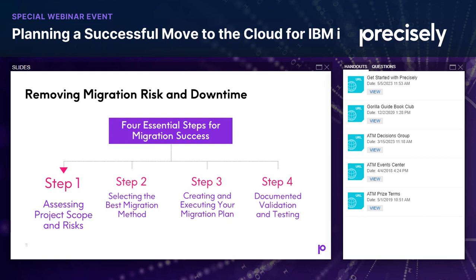Speaking of data, make sure that your data is prepared and cleansed, meaning you don't want to bring over obsolete data. You don't want to bring over a large file with a bunch of deleted records. If possible, as part of your planning, you'll want to do file reorgs and everything and only bring over necessary data and not stuff that's dirty or obsolete or anything like that. Security, big word these days. Security settings, functions, integrations. You want to have time and a place to be testing those because you want to prevent those vulnerabilities during a migration and especially at go live if you don't test appropriately.